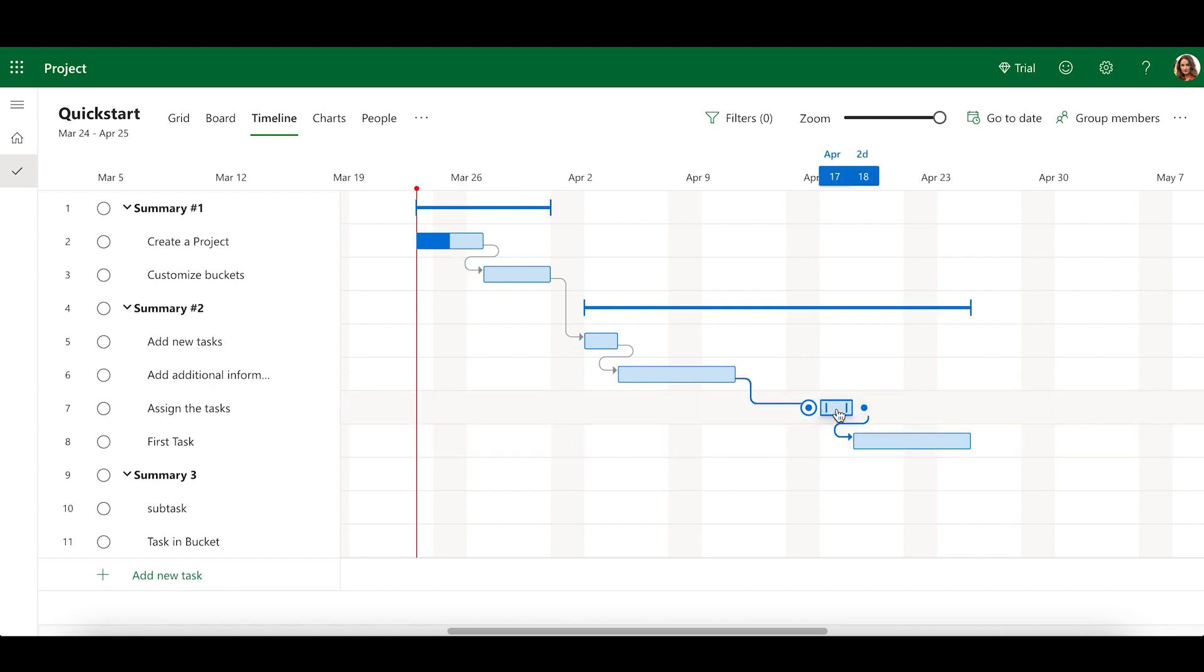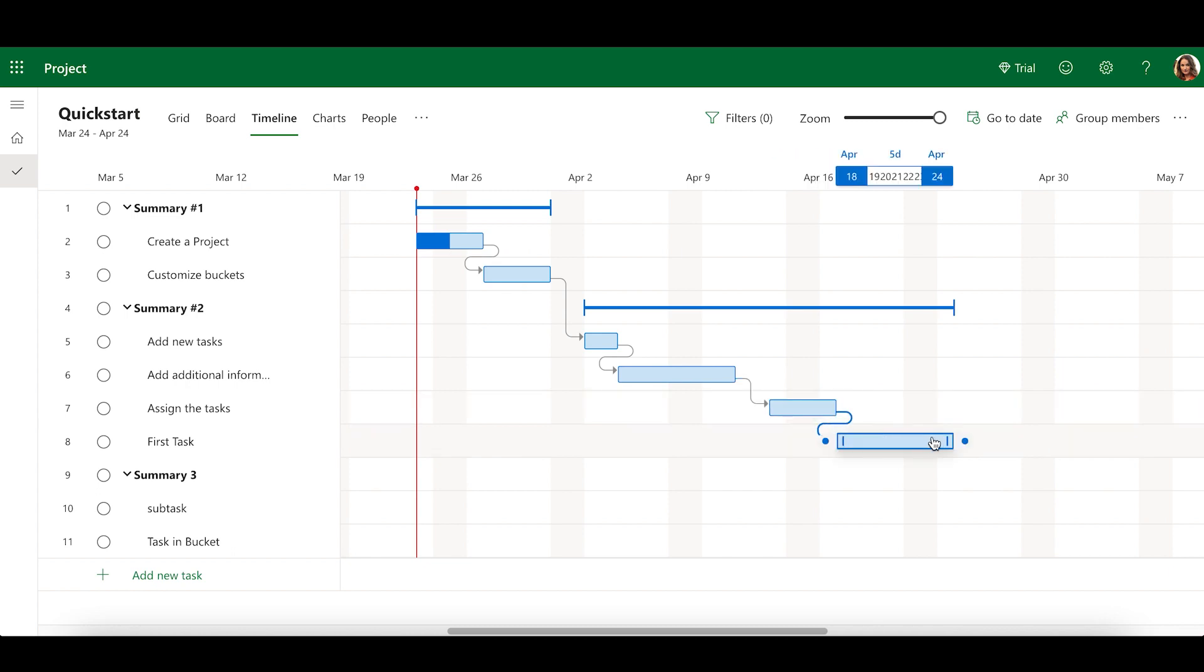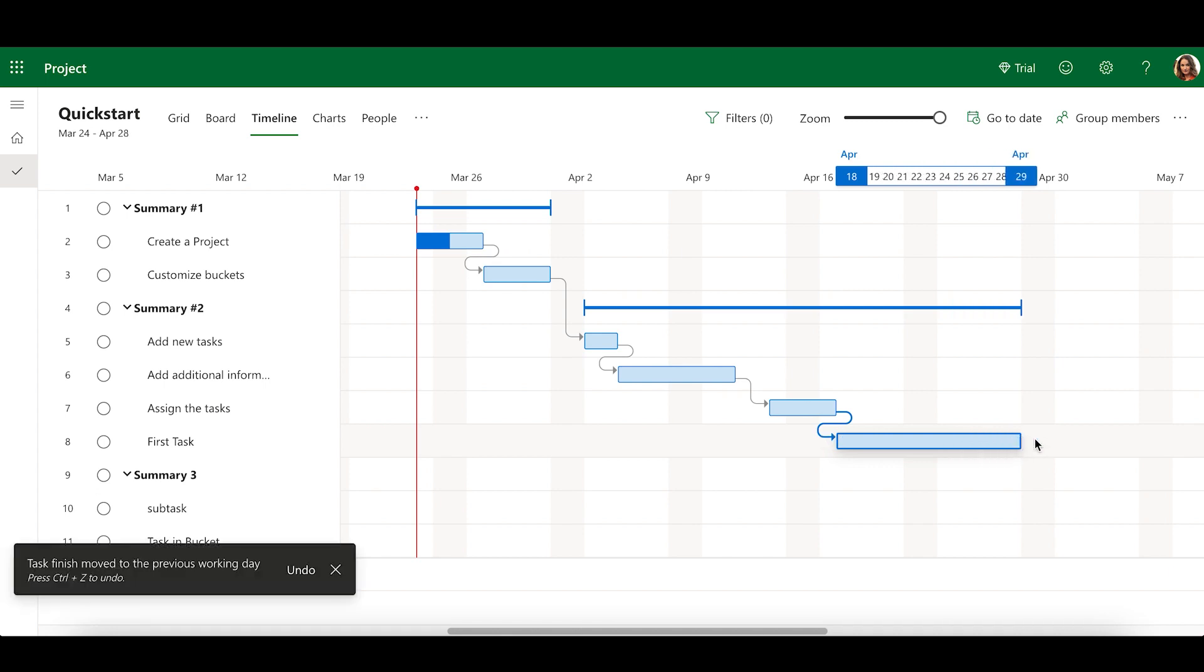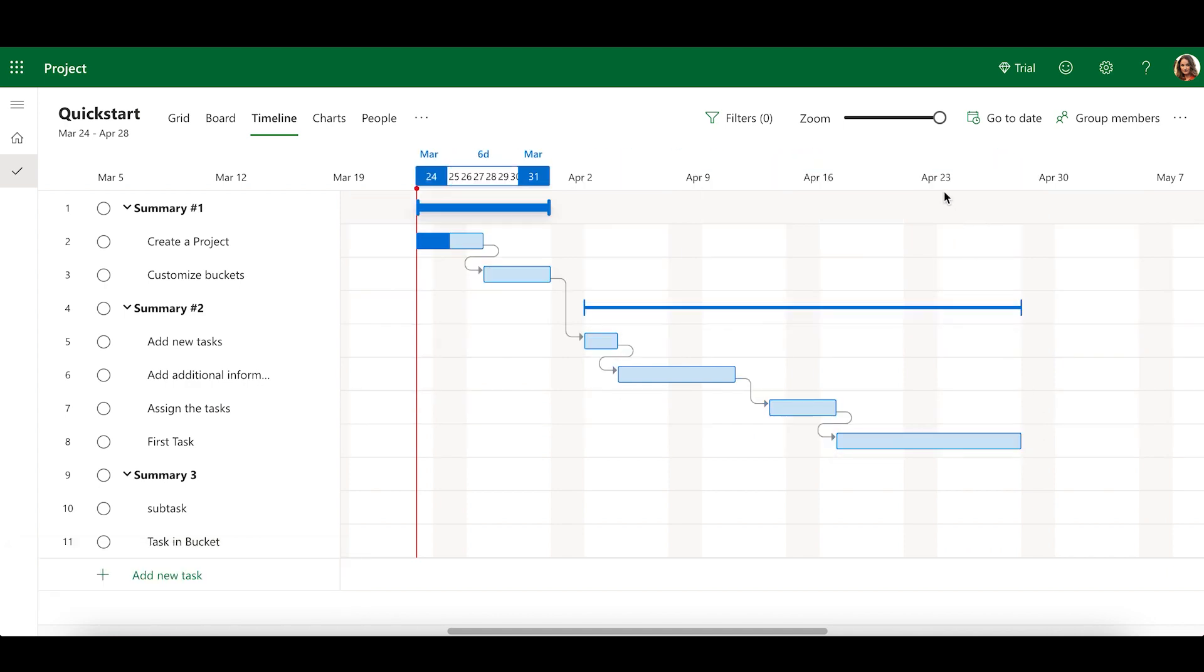To manage scheduling in the Timeline View, you can drag a task's timeline bar to offset its start and finish dates. You can also drag the left or right side of the task bar to offset just the start date or finish date, respectively. As you edit effort and dates for the first task, the start and finish dates of the dependent task will be updated automatically as needed.